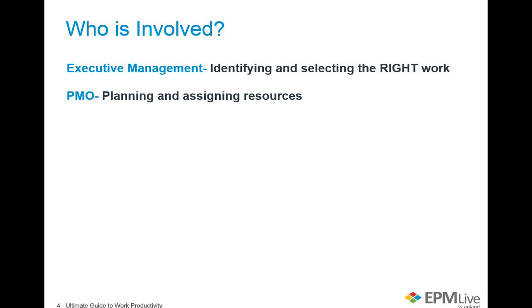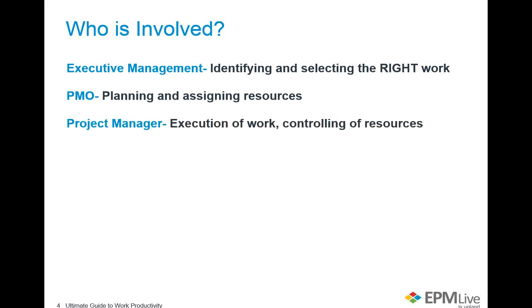Now, the project management organization, or PMO, they may be in an organization involved more on the planning and assigning of resources, the higher level allocation of resources, or this may be done in conjunction with the resource management or more functional organizations in a more matrixed organization. But the key is that they may be defining who goes on what projects, but maybe not definitively to what degree and what specific things they're going to work on.